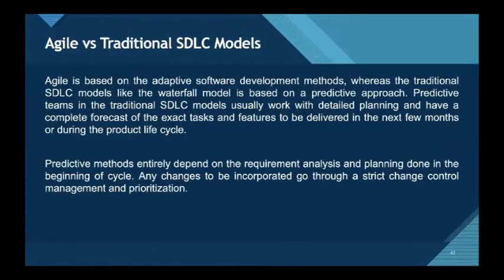Predictive teams in the traditional SDLC models usually work with detailed planning and have a complete forecast of the exact tasks and features to be delivered in the next few months or during the product life cycle. Predictive methods entirely depend on the requirement analysis and planning done in the beginning of the cycle. Any changes to be incorporated go through a strict change control management and prioritization.